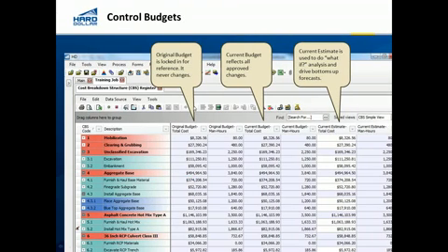From an SAP perspective in Hard Dollar, on the Hard Dollar side, we're taking the original budget. If it's locked for reference, it never changes, it's there. The current budget, which we're also recording in Hard Dollar, and then the current estimate, the what-if analysis that drives the bottom-up forecast for each one of the activities. So you can see the big difference here. It's really at that detail level, that excavation item, the embankment item. Everything's down at the work breakdown, cost breakdown structure level. And behind that are the resources, the crews, the material that drive each one of those items.